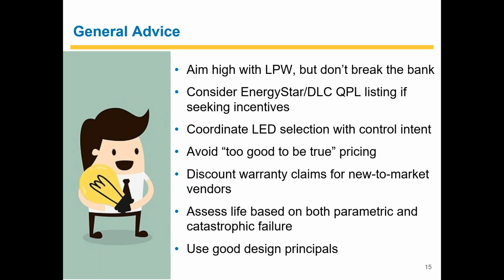And I tend to discount warranty claims for new-to-market vendors. I've been doing a lot of stuff with LEDs for over the past 10 years, and I've certainly had some experiences where we've gone with a low price vendor, only to find out that once maintenance issues start popping up and we're making claims against the warranty, I've had at least a half dozen times where the manufacturer's gone out of business and there's no one there to service the warranty. So when that happens, not only does the customer get frustrated, a lot of that can splash back on you as a lighting expert who pushed them in that direction. Keeping those things in mind is usually a good call.